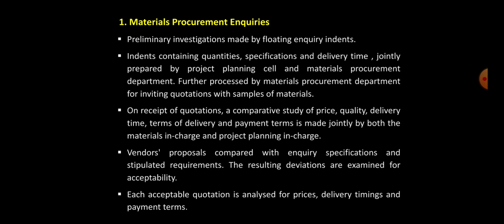The resulting deviations are examined for acceptability. Thereafter, each acceptable quotation is analyzed for price, delivery time, and payment terms. Vendor enlistment is based on its size, capability, past performance, market reputation, and if necessary, this may be confirmed by a visit to the vendor's works.